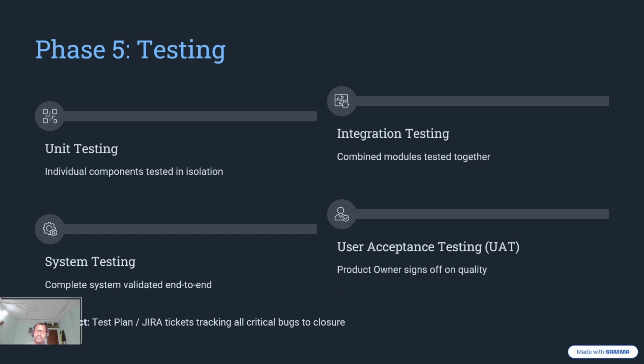This is the testing phase. Here the quality assurance QA team does the testing. They see whether the application functionality is as per client requirement or not. That is called functional testing. And they see whether the application is responding fast or not as per FRD, functional requirement document. That is called performance testing. Not only these two, they do many other types of testing also.